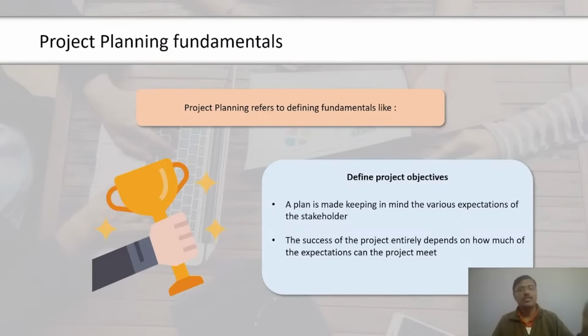For example, a project requires material procured externally through suppliers. In order to get that, you invite bids from 3 or 4 suppliers and assess their quotations. Based on the quotations, you can get an idea of the cost that will be involved in getting material to the project. Group decision-making technique is another important technique for project cost estimation.